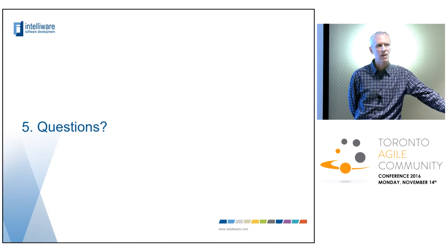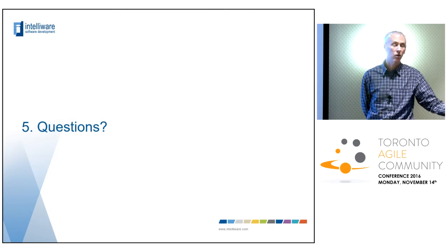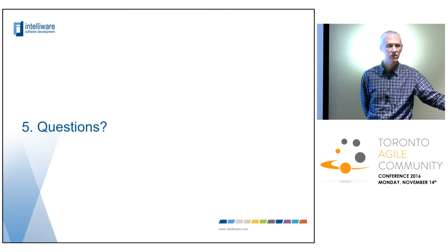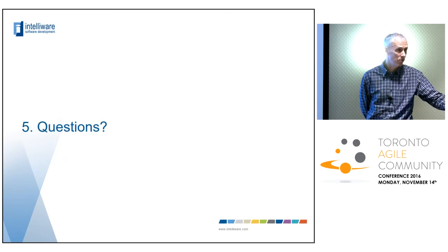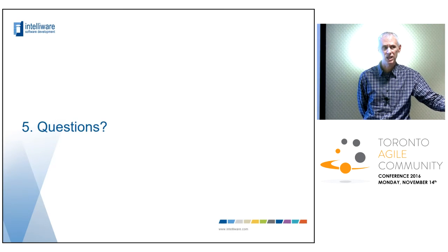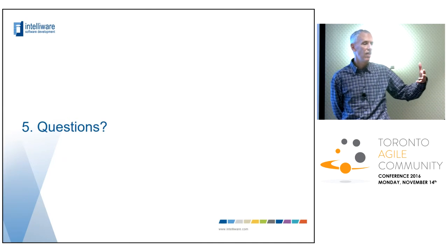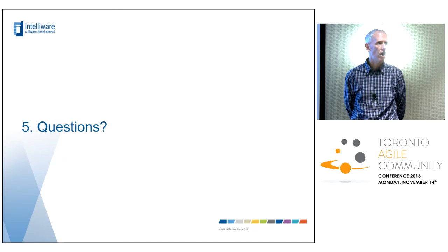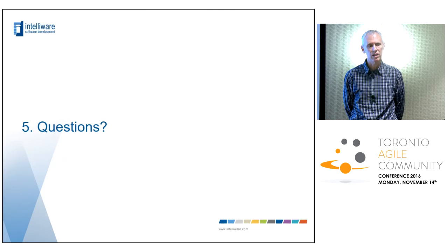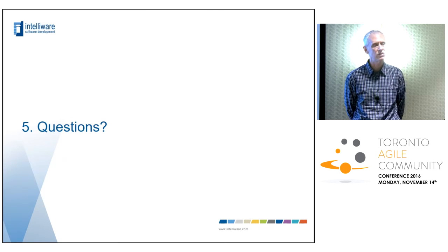Right, but I guess you just have to keep in mind that those other roles, you have to assume are working in slack, right? So basically, according to the theory of constraints, if you assume that one step in the process is your constraint, then it's constraining the flow of stories through the pipeline. Then the other roles are probably working with enough extra capacity that they can keep up without necessarily falling behind. Essentially, they can keep up without having to work overly hard to keep up to the constraint. And if you find they're falling behind, then you need to look at, well, are we playing against the wrong constraint, or is there something bottlenecking them?